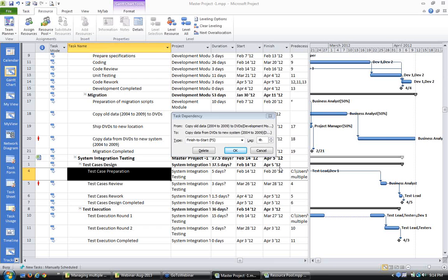What should a project manager bother about? How many hours are there in the day? Are the people allocated for that many hours only, or more hours or less hours? If more hours, we need to see that he should be levelled. So the work should be levelled.